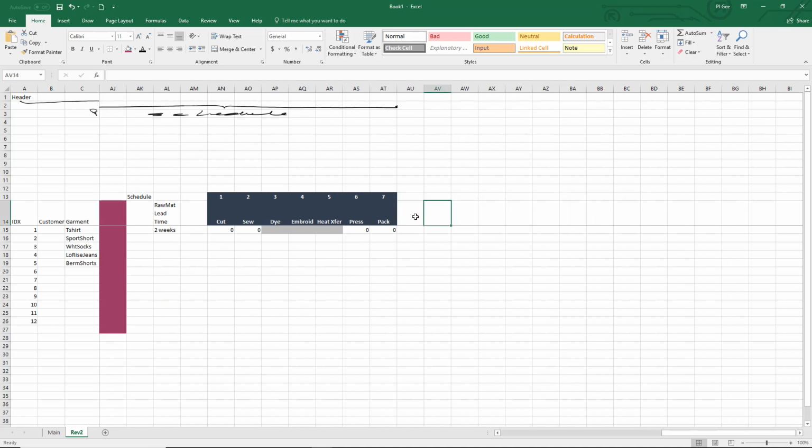Okay, and so I'm going to speed through this part because it kind of matches a little bit what we've already done. This is going to be the total unit time, right? And that's going to be in some huge amount of seconds. It's going to be something like 100,000 seconds. You can actually fill these numbers in. You're going to actually do the math. Pardon me. It will not be 100,000 seconds. The total unit time will be on the order of 500 seconds. My bad. Okay, let's call it 500 seconds to do every shirt. That's kind of a high estimate, but conservative. All right, so it's about 500 seconds.